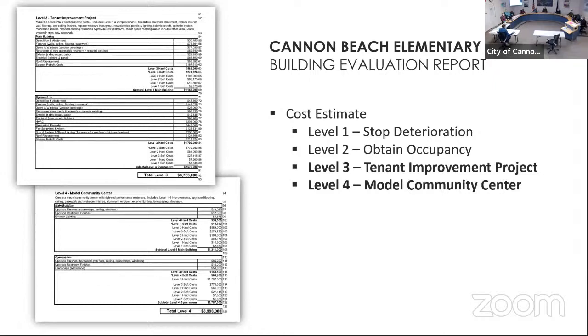Level 3, we're doing a full floor replacement. So we're going in and abating the entire floor, and the mastic on the walls holding up the chalkboards, and if there's any popcorn ceilings, for example, that sort of thing. In level 3, we're touching everything, so we're going to have to do abatement throughout the building. But for level 2, it's not a requirement, just repairing the spots that need it. Correct. Okay, interesting. I don't know, Zach, if you know, but I've never really seen it as a requirement to do hazardous materials abatement, unless you're obviously affecting the area, but to just abate things on their own.